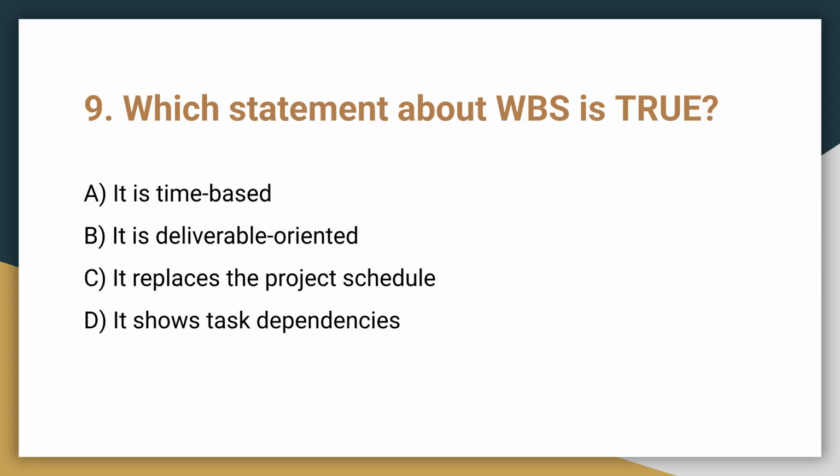Question 9. Which statement about WBS is true? A. It is time-based, B. It is deliverable-oriented, C. It replaces the project schedule, or D. It shows task dependencies. The correct answer is B. The WBS is fundamentally deliverable-oriented, focusing on the outputs, not the activities or timelines.